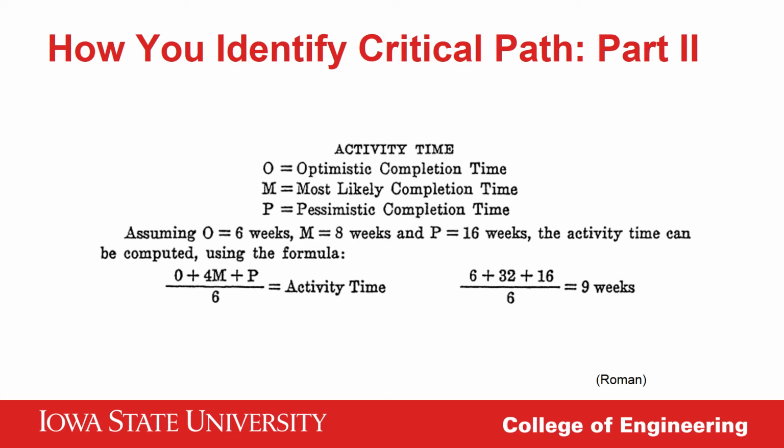Since there weren't many comparables for scheduling, some wise consultants developed a method where educated guesses were made by engineers and managers at an optimistic, a pessimistic, and an expected duration for each activity. Confidence levels were then assigned to each task based on how close each of the estimators were to each other. On the bottom left-hand side of this slide, you can see that the most likely completion time was given a weight of 4 times that of either the optimistic or pessimistic completion times.